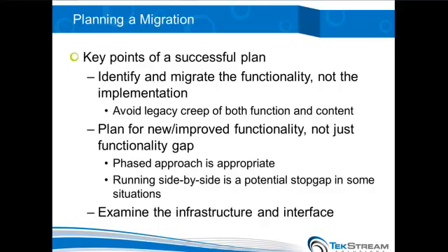The first pass of things is, okay, I'm going to identify all of this content. I'm going to take a look at all of this stuff. And I just want to make sure, how do I know that I can move all of this over to the new environment, one way or another? One of the key points to consider as you go through is what needs to be moved. What is the business purpose behind having that there? And is it useful to move? That will save both time and effort as you're doing a migration. And that's what I call legacy creep.